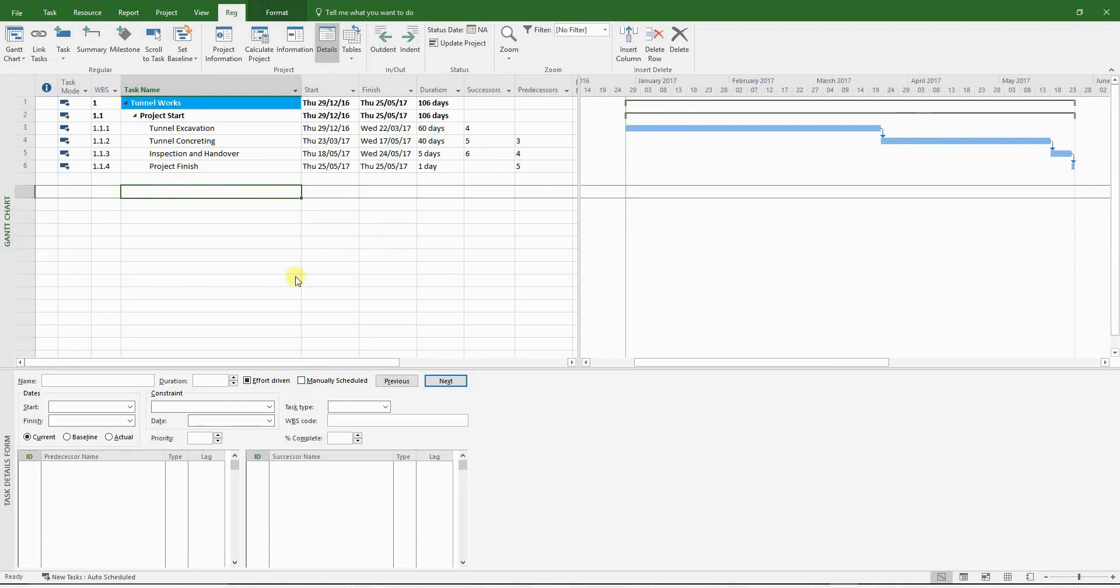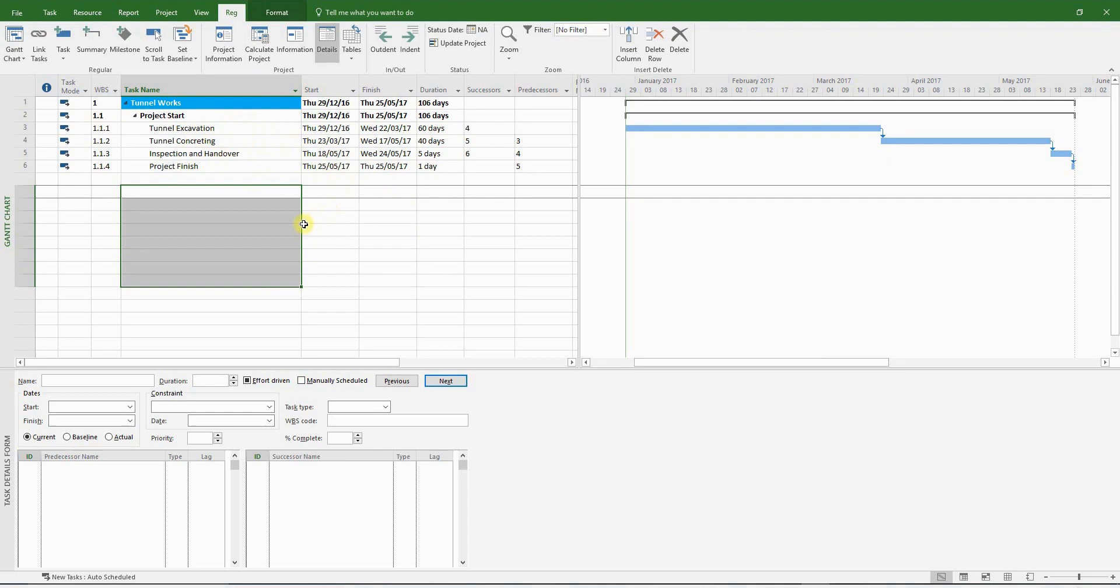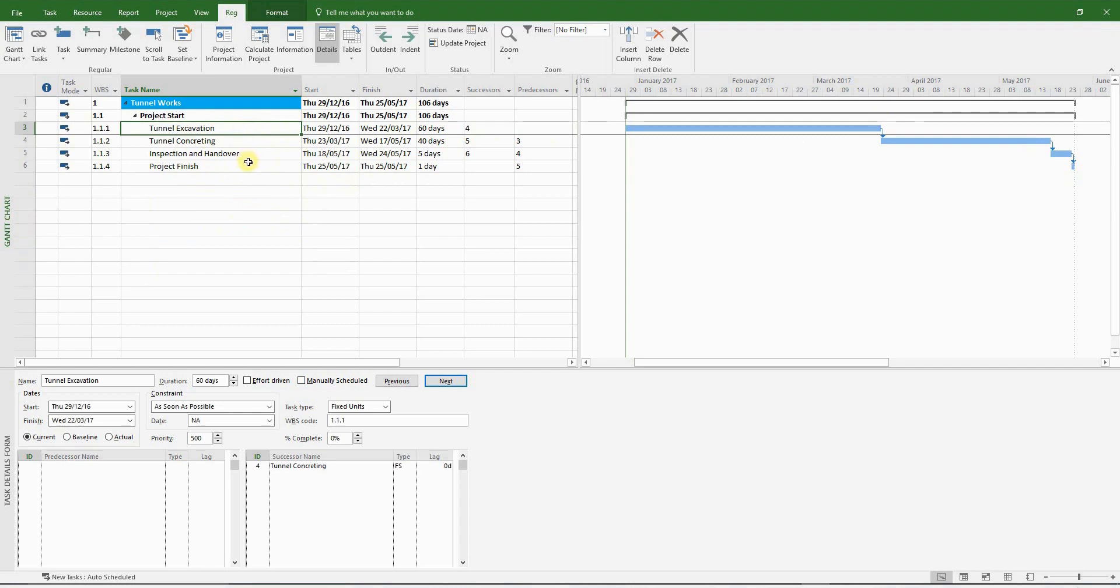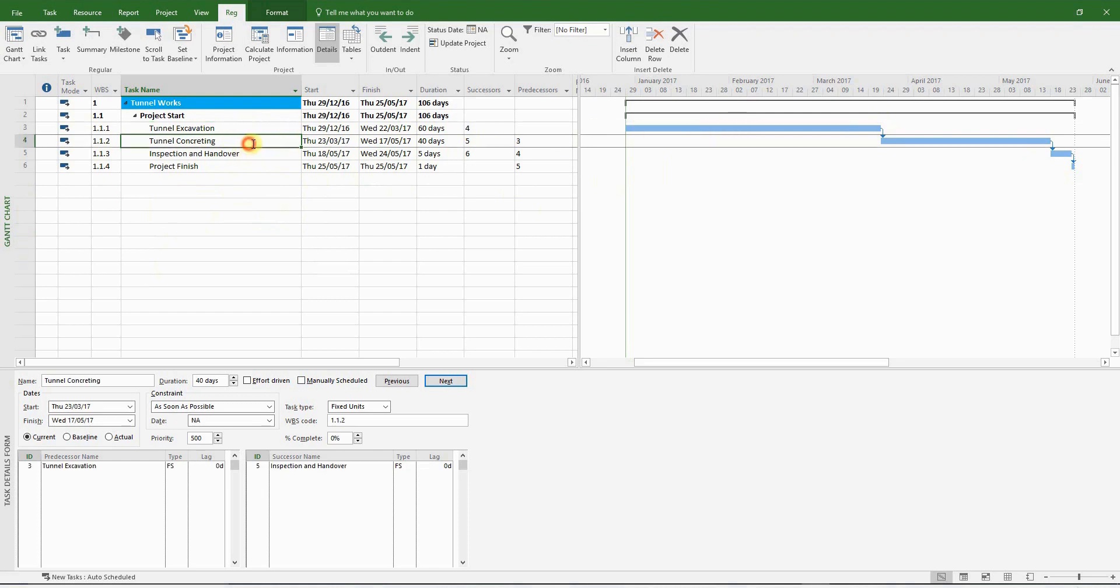Different delay analysts impact programs with delay events in different ways. Some of them tend to put all the delay events at the end of the program and link them to the relevant activities. Others tag on the delay events to the end of any activity that is impacted. But what I like to do is to split any activity that has been impacted by a delay event and insert the delay event based on the exact date of occurrence.